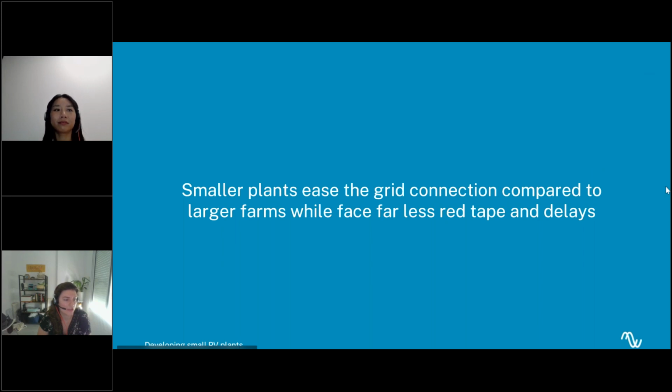So depending on the market, you have different rules and regulations to develop solar plants, usually involving bureaucratic processes of different lengths and all kinds of financial aids, right? From my experience, I know, for example, that in Australia, a generating system connected to the grid of less than 5 megawatts is totally exempt from registering as a generator in the market, which releases developers from massive regulatory challenges, delays, and costs, right? But this is not only in Australia, this happens basically everywhere.